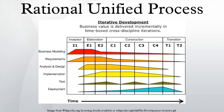Inception Phase: The primary objective is to scope the system adequately as a basis for validating initial costing and budgets. In this phase, the business case — which includes business context, success factors, and financial forecast — is established. To complement the business case, a basic use case model, project plan, initial risk assessment, and project description are generated.